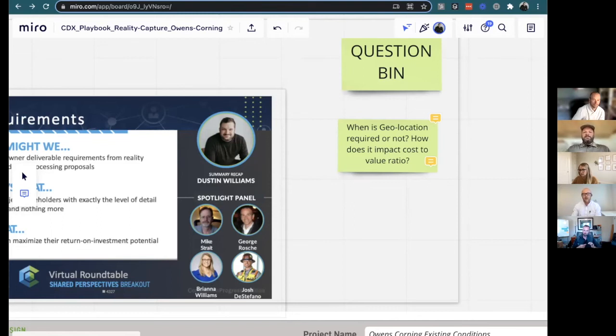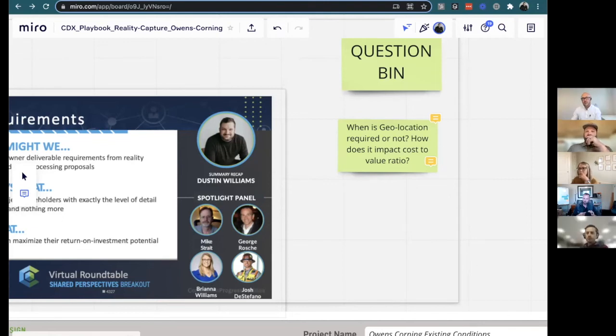This wasn't a self-performed concrete job, and we were seeing a lot of issues. We calculated the return based on the rework we prevented, because we found lots of issues. One deck had seven missing embeds, for example, and the rework we prevented was $270,000, right? So whatever that is, roughly a 6-to-1 ratio.